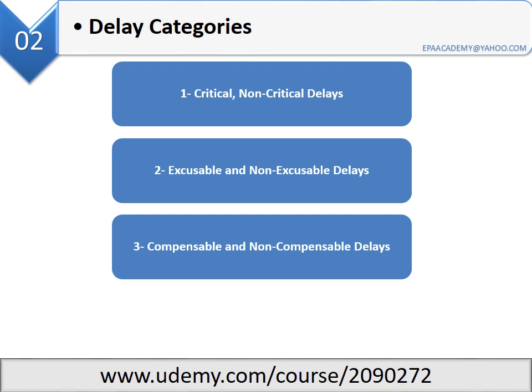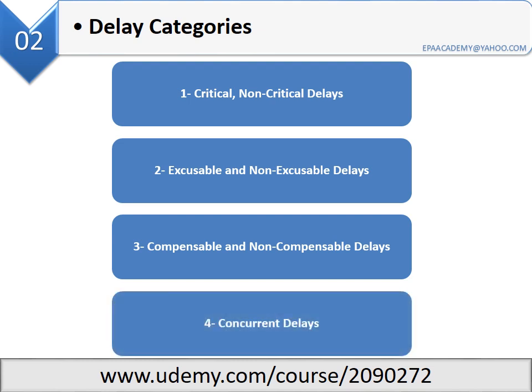Three — compensable and non-compensable delays. Compensable delays are delays where the delayed party is owed money to compensate for the loss due to the delay. Non-compensable delay is a delay where a time extension is owed but no compensation is owed to the delayed party. Four — concurrent delays: employer and contractor delays occurring concurrently.